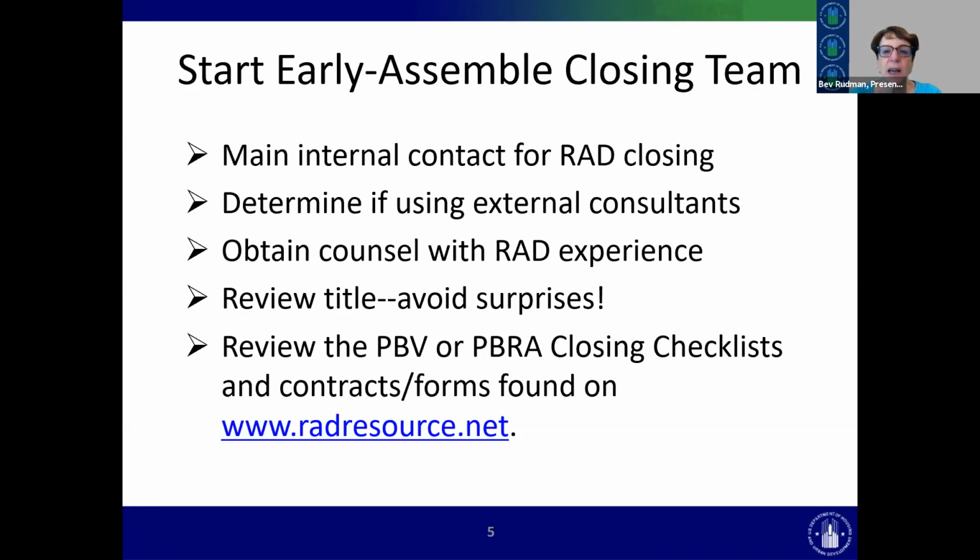And then review title, avoid surprises. So title is one of those things that you can be going along very well for 40 years, never knowing that there was some problem on the title. So it won't affect you until you go to do a real estate transaction, which guess what this actually is, because you're releasing your declaration of trust and you're placing a RAD use agreement on this property. So the property has to be well defined and it has to be okay from the title perspective.